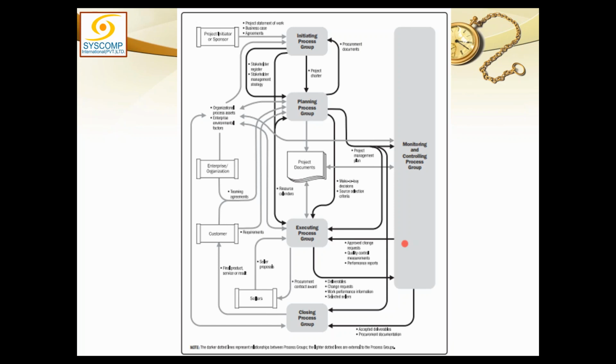So what is the journey of this information? It starts from execution in the shape of work performance data. It goes to all controls of monitoring and control. It gets processed and converted into work performance information. All the work performance information is put together, collected by monitor and control project work, and further analyzed and consolidated into a work performance report. Are you with me on this? Do you understand how the data was converted into information and then into a report?